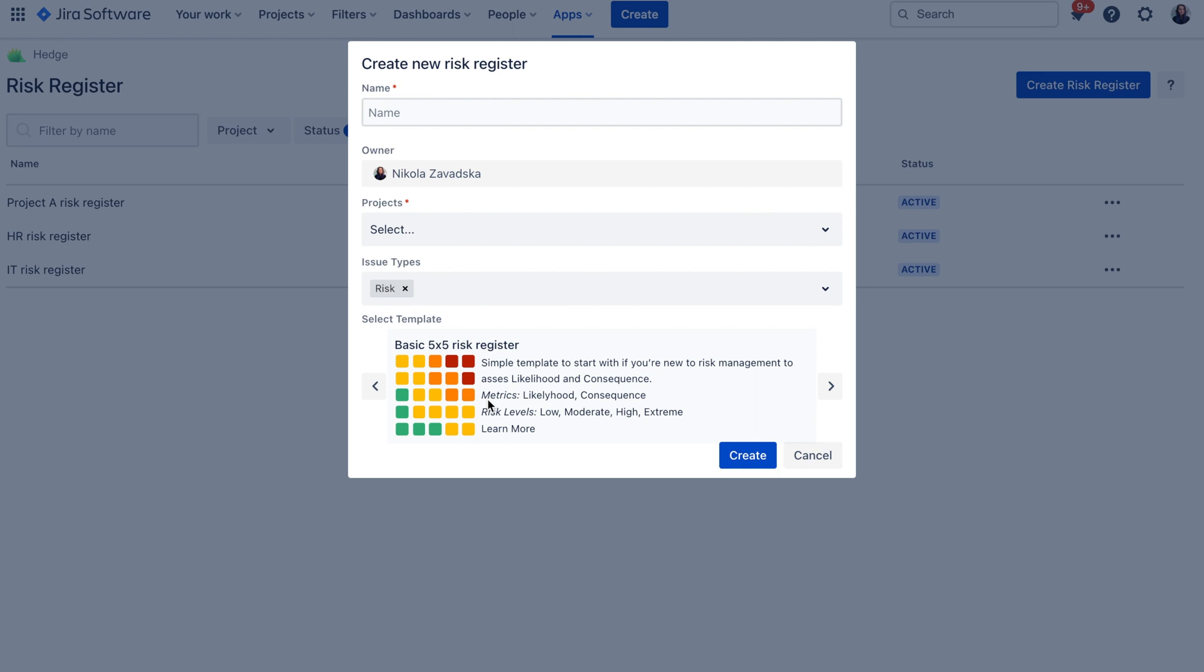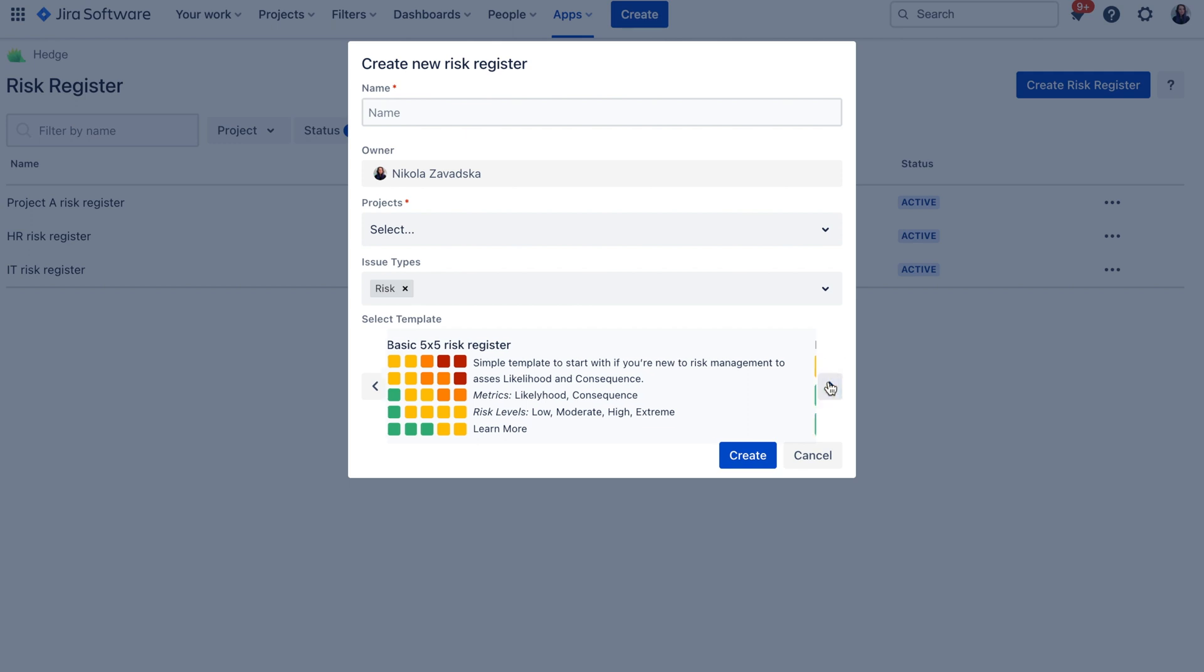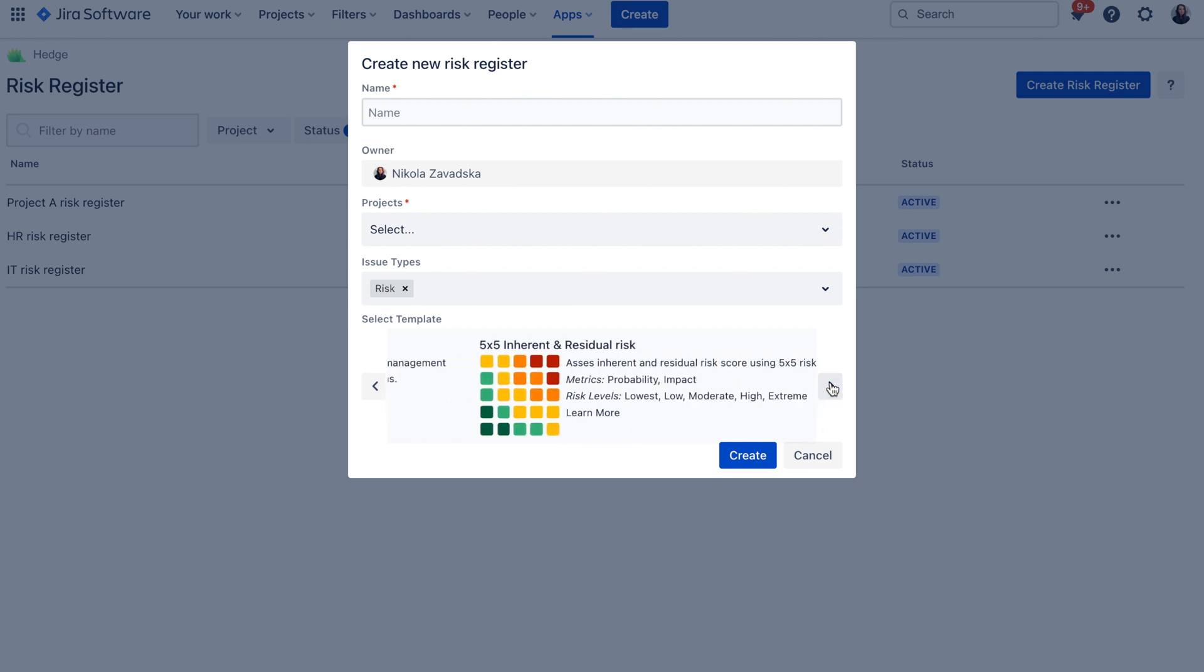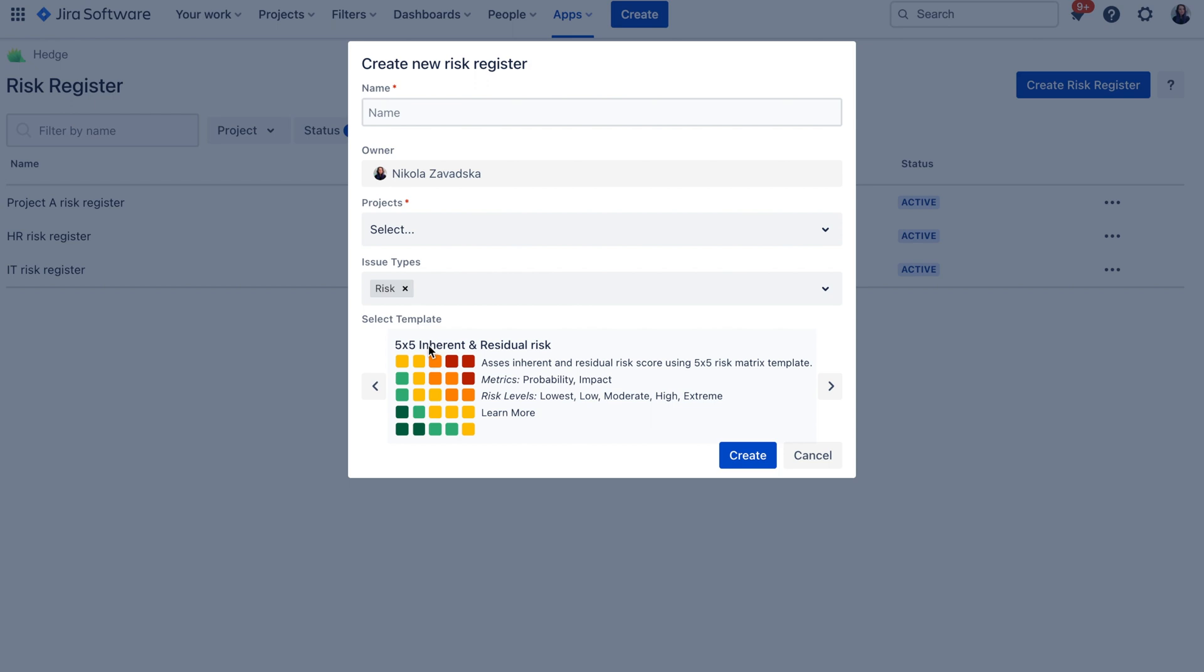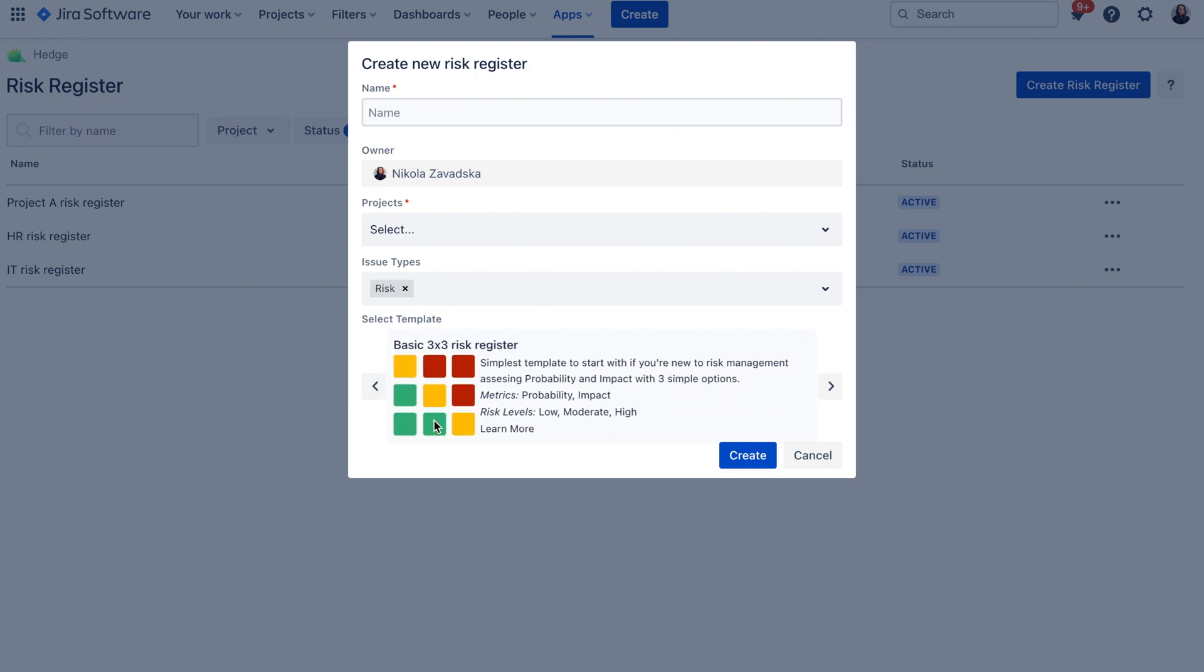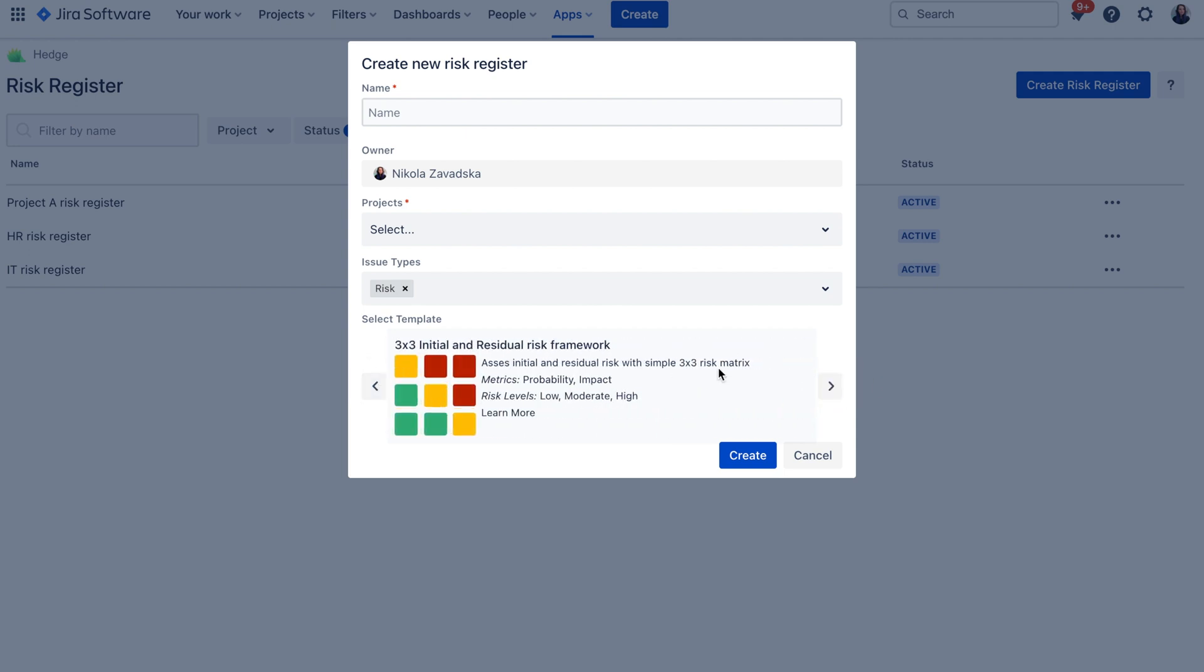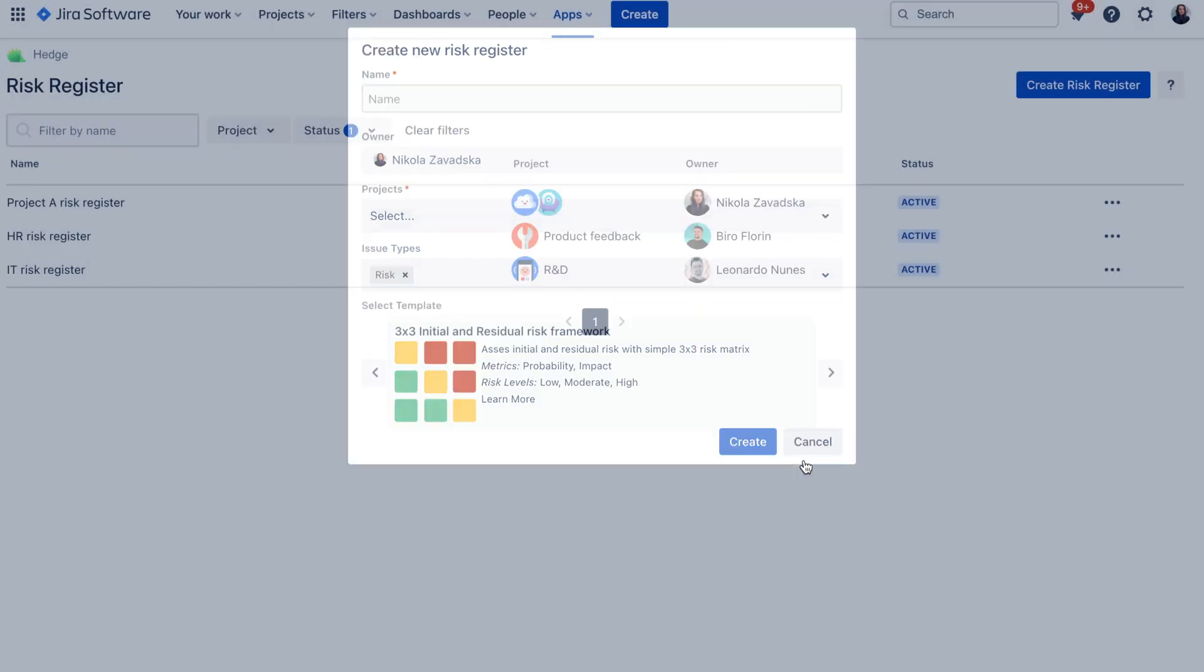And the last but not least you also need to select the risk management template. Now the risk management template usually differs with the size of the matrix and what kind of metrics you are assessing but also the risk level setup and if you are also managing inherent and residual risk or only the risk in general. So you can select one of the templates that fits your needs and then create a risk register.